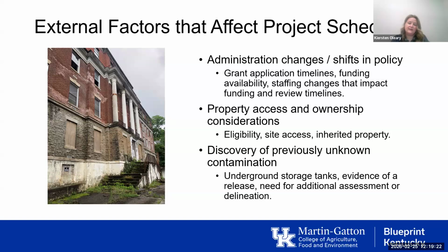Also, there can be delays with property access and ownership considerations, whether or not the site or the entity is eligible, having access to a property, or if lots of folks, siblings, inherit a piece of property and they have disagreements about how to move forward with having environmental site assessments performed, or what to do with the property transaction. That can have an effect on your timeline as well.